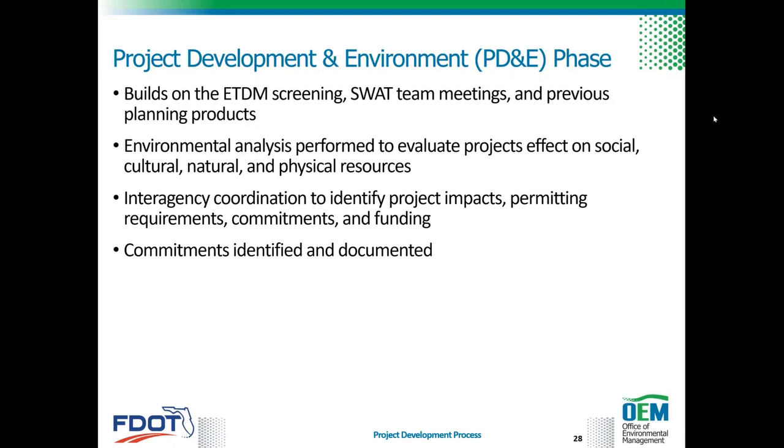Throughout the PD&E process, interagency coordination is conducted to identify project impacts, permitting requirements, project commitments, and funding sources. Commitments identified during the PD&E process can include requirements for future coordination, and also for avoidance, minimization, and/or mitigation for unavoidable impacts to resources.